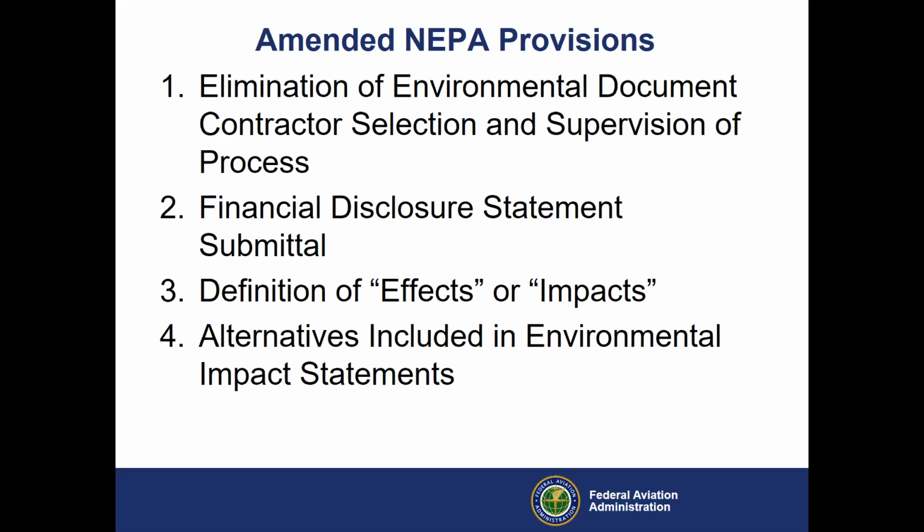The statements had to specify that the contractor had no financial or other interest in the outcome of the project. The statement also had to be prepared by the lead agency or cooperating agency. The amended regulations now require both contractors and applicants preparing EISs or EAs to submit disclosure statements identifying any financial or other interest in the outcome of the action.